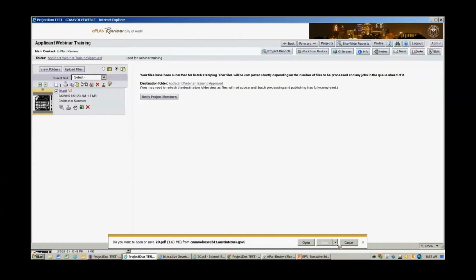Now you're ready to go build it. So you've downloaded your approved stamped plans. You come in, you get your permit, or you go online and then pay for your permits online. Get your permits emailed to you, or just print them off right there from Austin Build and Connect, and then go build it. And then go back to your Austin Build and Connect to request your inspections, and then the inspectors will come out. They'll look at their version of the approved plans on their tablet. They'll approve you, get your certificate of occupancy, and you're good to go. So that in a nutshell is e-plan review.